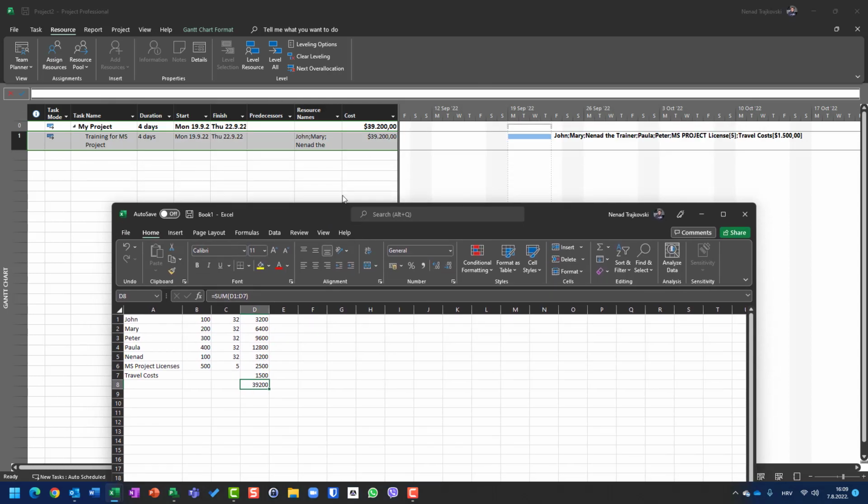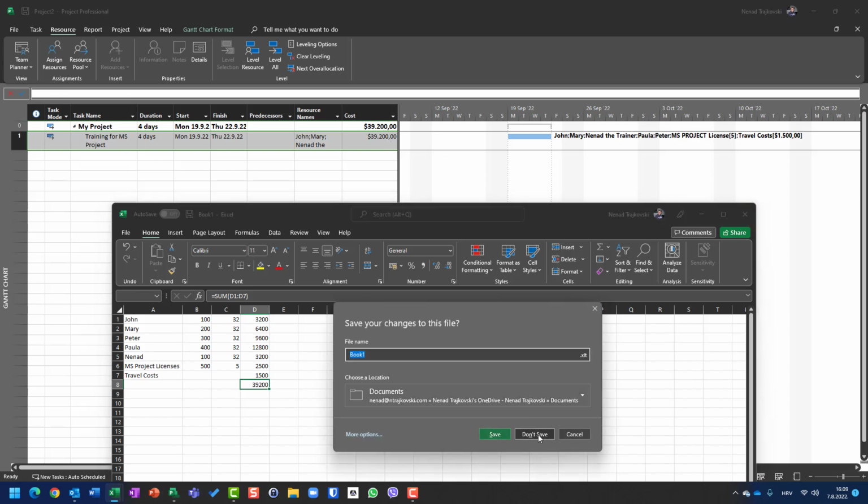Exactly like here. John, $100, 32 hours. Mary, $200, 32 hours. Peter, $300, 32 hours. Paula, 32 hours, $400. Nenad, $100, 32 hours. 5 project licenses, $500 per each, which is $2,500. And I will have one fixed travel cost, which is $1,500, which leads us to a total amount of $39,200. But you already know that.